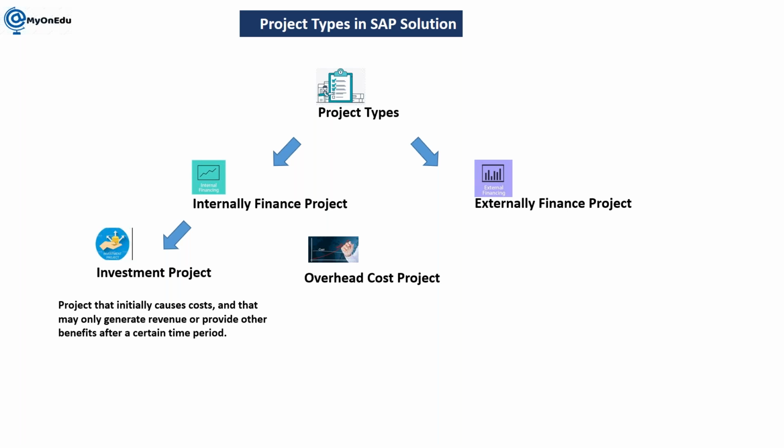There are different factors, KPIs, based on which you can calculate the probability of success of this project. Some KPIs are like NPV, net present value: if NPV is positive, in that case it will be beneficial for you. Similarly, payback period, how much time it will take to start to come into the benefit portion. So these are some of the KPIs, based on which you can analyze whether this project is beneficial or not.